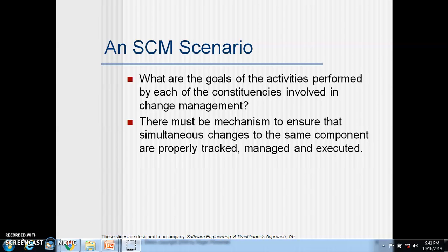The engineers have their own workspace for creating, changing, testing and integrating code. At a certain point, the code is made into a baseline from which further development continues and from which variants for other target machines are made. The customer uses the product. Since the product is under configuration management control, the customer follows formal procedures for requesting changes and for indicating bugs in the product. Ideally, a configuration management system used in this scenario should support all these roles and tasks.